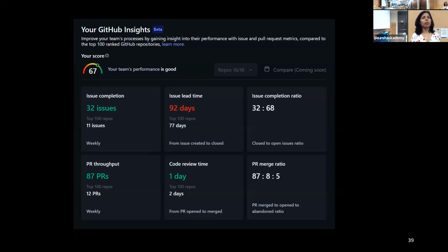The reason we use ZenHub and didn't just go with GitHub projects is that when I was looking at this six to eight months ago, GitHub projects was not giving me a way to put in estimates for issues. I think they're going to build that feature, but as of a few months ago they were not doing that. So for that reason, I decided to use an external tool that could pull our GitHub issues, where I could set estimates and track issues like this.